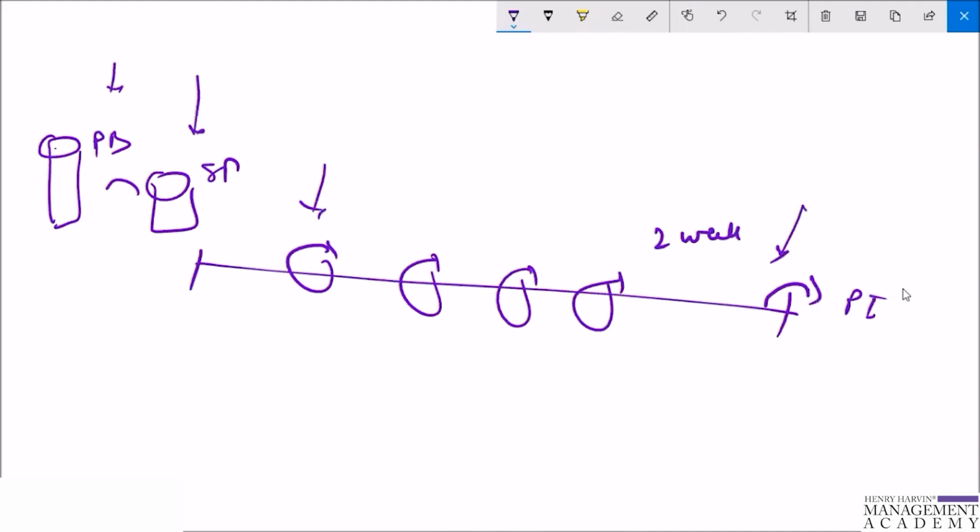The answer is that user stories are written throughout the agile project lifecycle. Usually a story writing workshop is held near the start of the agile project, when the project is being started, and everyone on the team participates with the goal of creating a product backlog that fully describes the functionality to be added over the course of the project, or a 3 to 6 month release cycle. Within it, some of these agile user stories will undoubtedly be epics. An epic will later be decomposed into smaller stories that fit more readily into a single iteration.